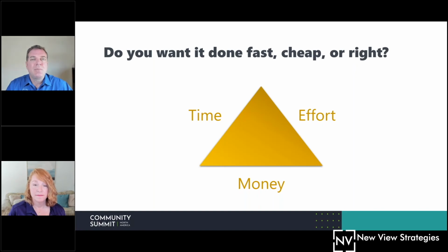So the team didn't know how to handle scope change, didn't know how to handle even the design of it, because if we found anything that didn't fit, well, what do you do? You're either extending the project or you borrow from something else or you have to ignore it. And guess what? They didn't get it done in 5 months because they didn't have a usable system after 5 months. Well, we could go on a long time on that one, but let's move on.